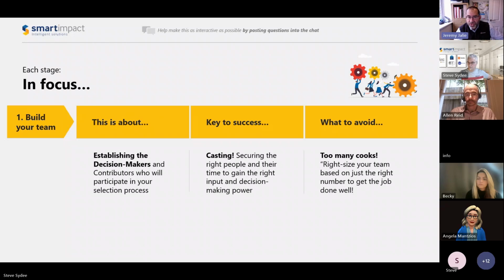You're going to need a project manager, and that project manager should ideally be assigned from the beginning to lead and run the procurement process with the project board right through to the delivery of the system. You probably need someone from the technical team to support around data integrations and any technical aspects, questions around what the rest of your technology stack is and how what you're delivering fits into that.